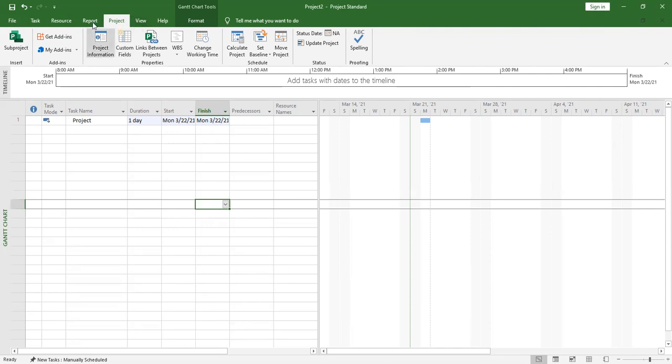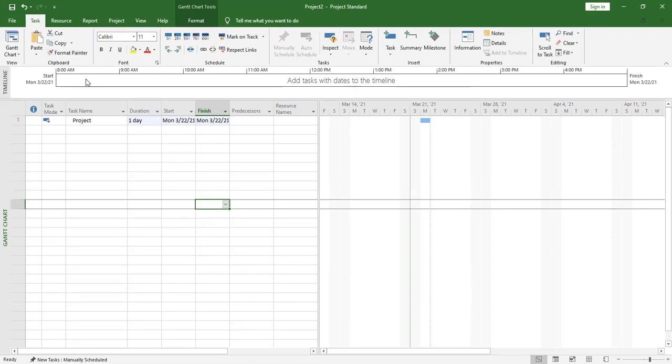Yeah, we just didn't cover it in detail, but the other concept you're talking about, crashing a project, I don't think the software can do it automatically. But you can force a deadline, like you can force your tasks to be completed by a certain deadline, and you assign more resources to them. We can maybe cover some concepts and you see the way you can go about that.